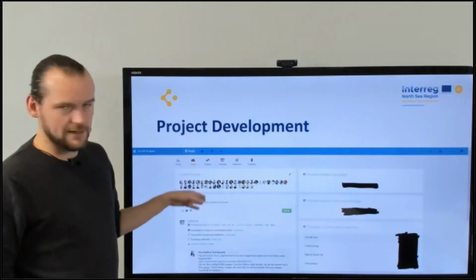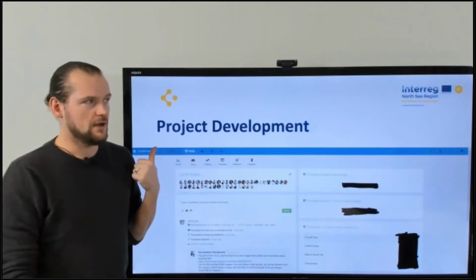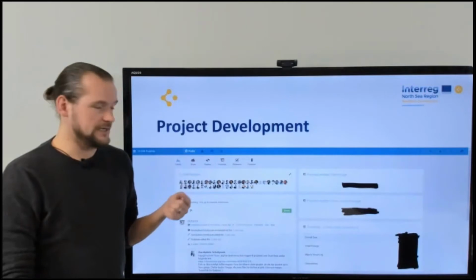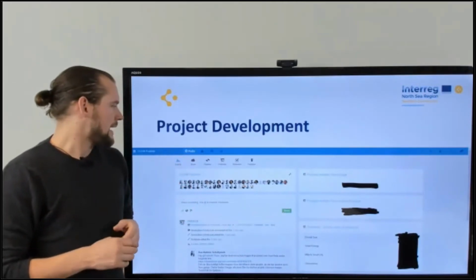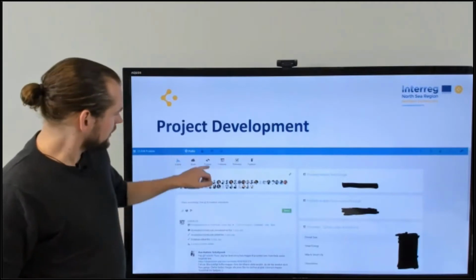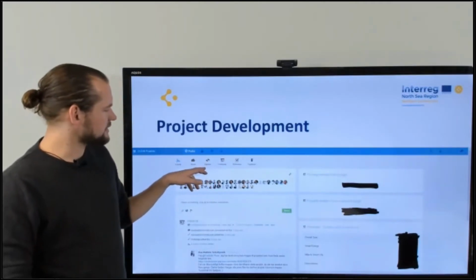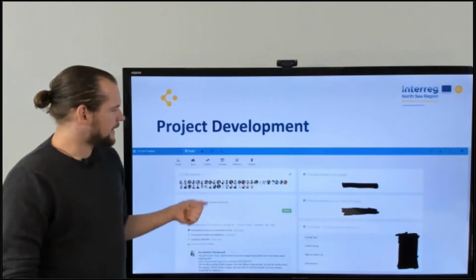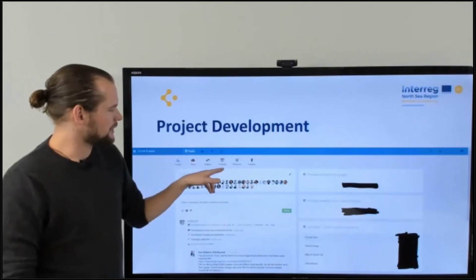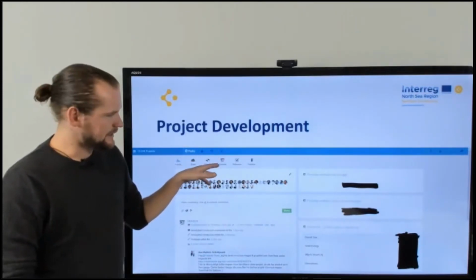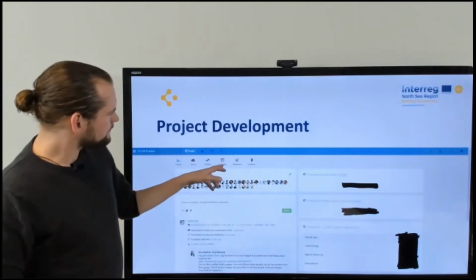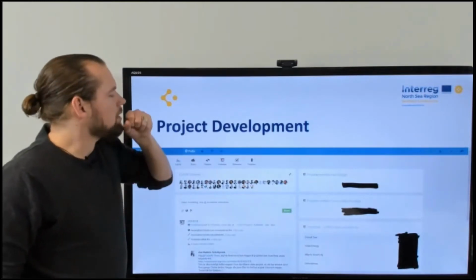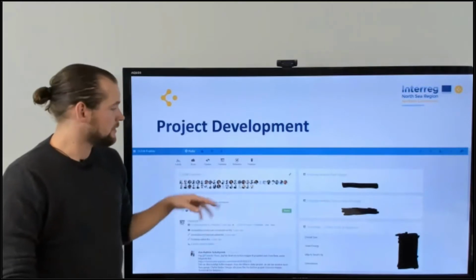We only put stuff in the pipeline when there's resources allocated to the development of the project, when there's a team put down to do it, and we have identified a way of funding it. In all the time that we're developing the project, it's in the pipeline all the way until an application or the like, and then when it is done, we put it into the portfolio. Our active portfolio is 59 projects at the moment. There we have all the basic information and so on, which I will show now. And then after the project is done, we put it into a reference.